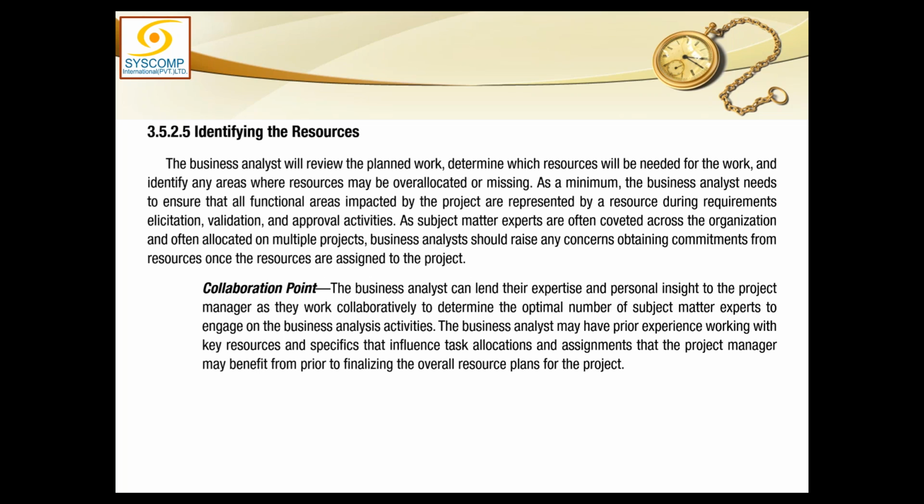As subject matter experts are often coveted across the organization and often allocated on multiple projects, business analysts should raise any concern about obtaining commitment from the resources once they are assigned to the project. Here again, we may require the RASI chart. These resources will have their roles and responsibilities assigned in the RASI. If certain stakeholders or subject matter experts are allocated on multiple projects, then it must be clearly communicated and commitments obtained about their availability for each of those jobs.